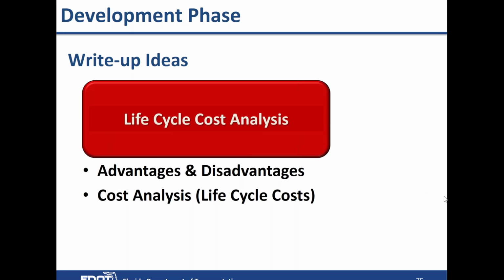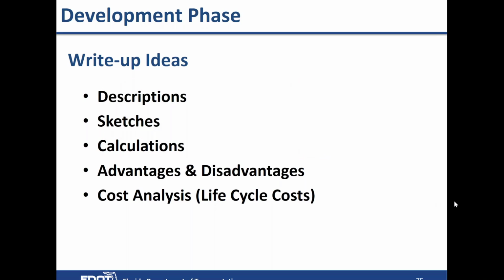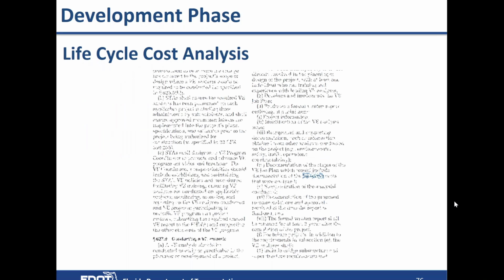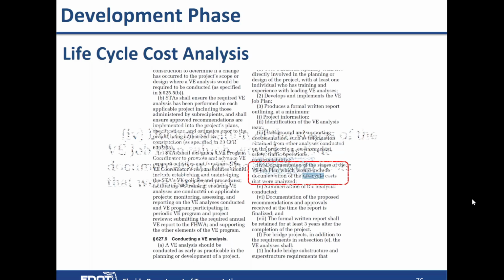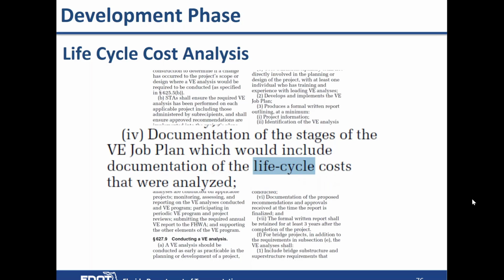And then life cycle cost analysis. I'll go a little bit more into this now. Life cycle cost analysis is mentioned in the Federal Highway Regulation. It's documentation of stages of the job plan, which would include documentation of life cycle cost analyses that were analyzed. It's not required. It's highly recommended.